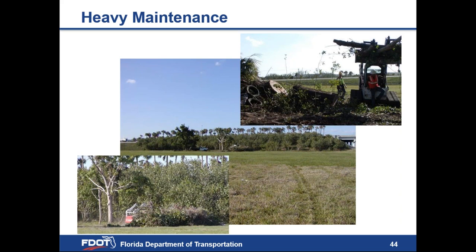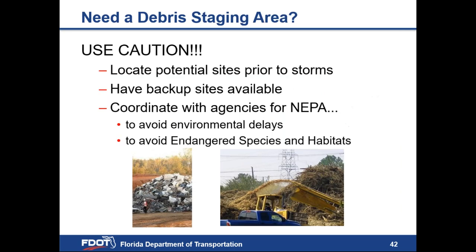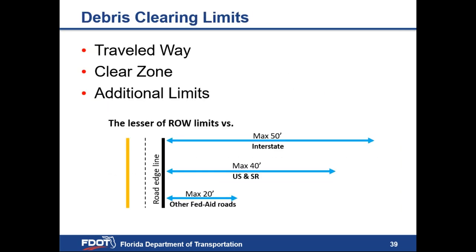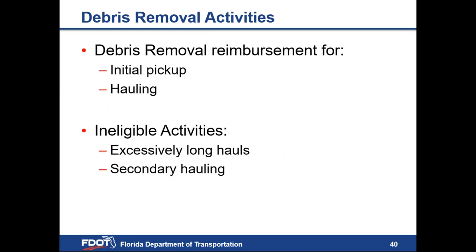Mahmoud clarified on extensively long hauls: just go to the closest staging site — it doesn't matter if it's five, 20, or 30 miles, as long as it's the closest one to you. On secondary hauling: if you haul to a temporary location, that's eligible. Moving it from the temporary location to the permanent location is considered secondary hauling and would not be eligible for reimbursement.